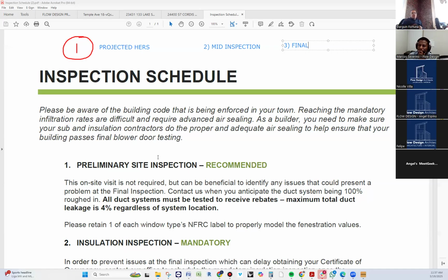That triggers a failure. Typical failures too are like if caulking wasn't done properly on all the electrical and all the plumbing, all this ductwork needs to be nicely caulked, nicely tight. That will trigger problems with the air, to the basement, because most basements are unconditioned space. They're basically treated as outside space. So if there's leakage between the floor and the other floor, things are going to go right through. The holes may be too big for any baseboards, and then air just comes right through it. So that triggers failure most of the time.